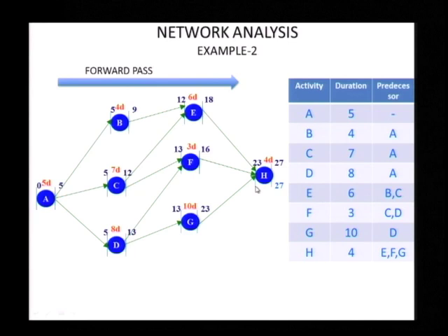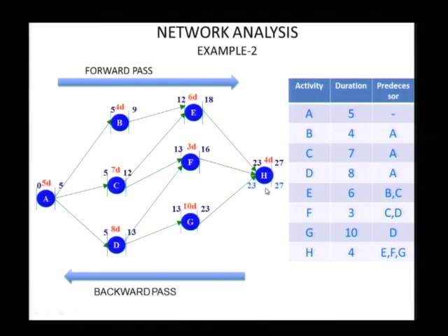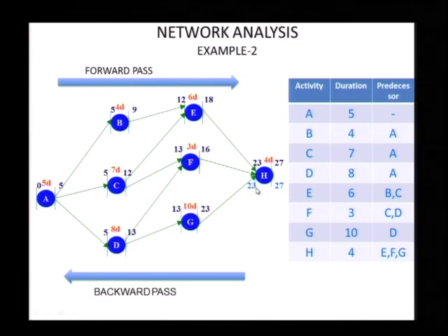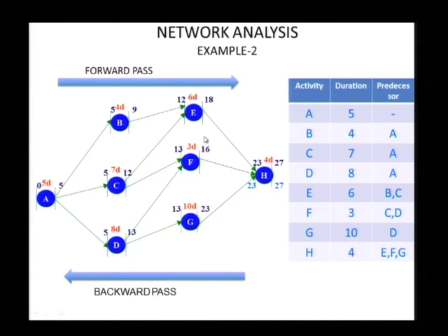So we will find that this has to complete on 27. We are fixing that. Working backwards goes to 23. So what is the latest finish? Yeah, so all of this can finish as late as 23 without compromising the project duration.